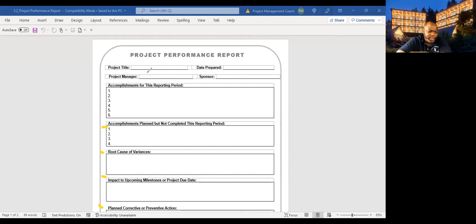See that? Project performance report. Now, on some projects, the report may not look like this. On some projects, the report could be a 4-up. It could be a 4-up chart. In other words, it could be a very high-level chart with 4 columns that have a status of, for example, risks, issues, key decisions, and things such as that.